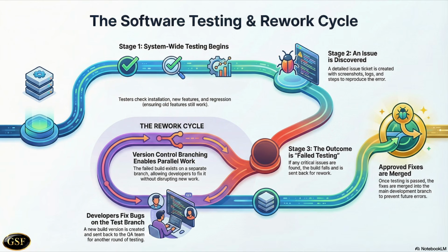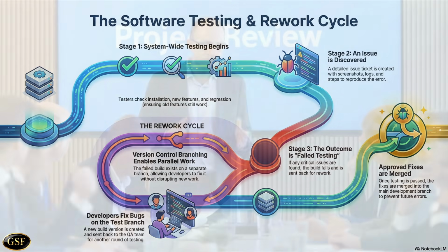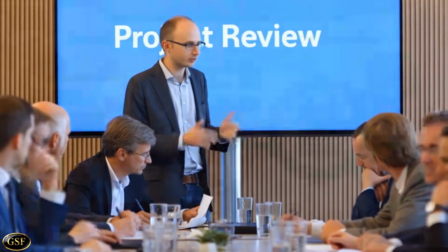However, since changes have now been made during this rework phase, then these changes will need to be merged into the development 1.2.2.0 branch that the rest of the development team are working on, to ensure that the errors encountered in the first time box do not reappear in the testing of the second time box. This merge phase is critical, and again needs to be factored in by the project manager and their team into the timescales of the project.